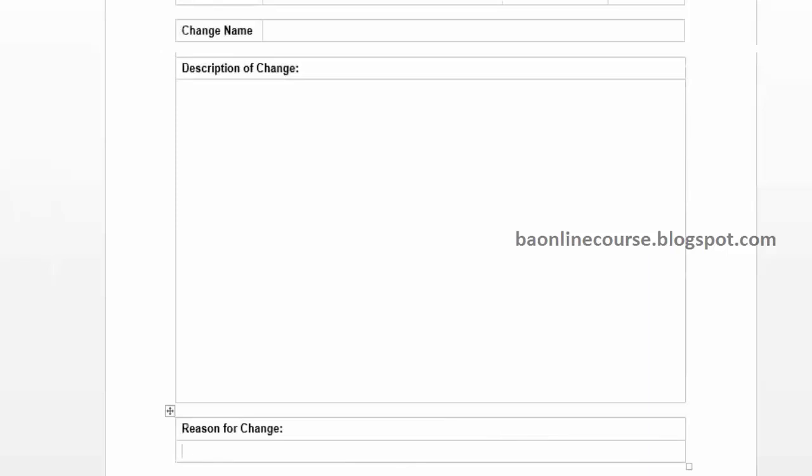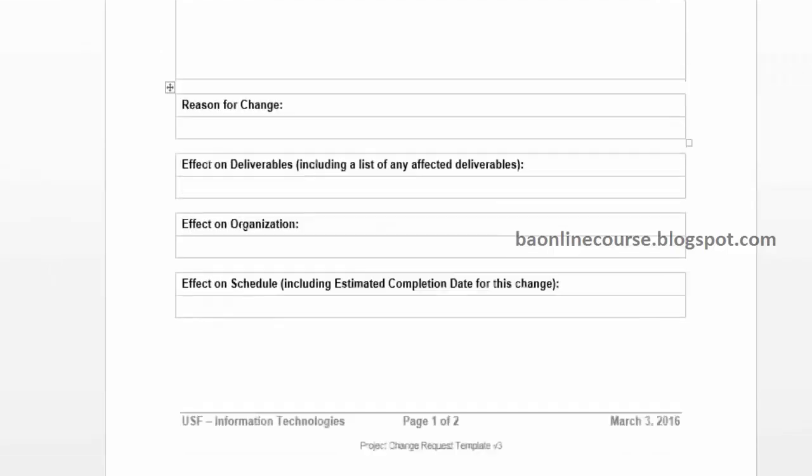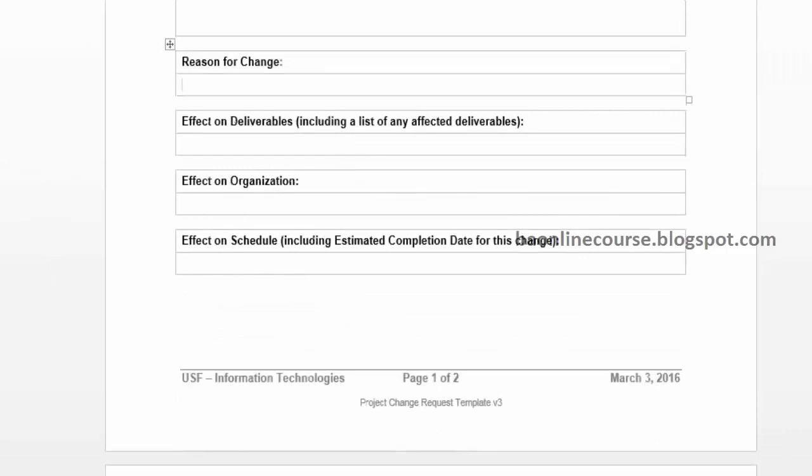Then you'll have to give a justification. Usually the SME would tell you why this change is required, what is the benefit you will get, right? And what all functionalities it is related to, right? So you have to figure out, does this have any impact on existing functionality, and you have to clearly mention that, right? And what is the estimated time and cost to complete, okay? Is there any process change, any standard operating procedures that have to be changed, any documentation or process changes have to be mentioned. All that you'll have to list down over here. Okay,